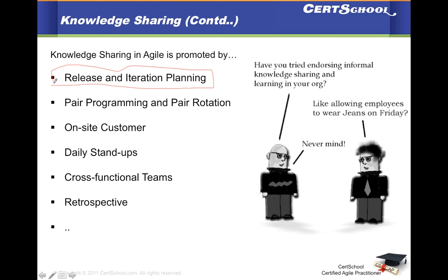Also, the people who are going to implement, the development teams, are made aware of how the release plan looks, whether you're going to have 4 releases in a year or a release every month. Those things are very important for the engineering team to know, because it can affect them indirectly. They may ask good questions if they are shown that plan, and it's possible that product management may have to change that release plan based on that.